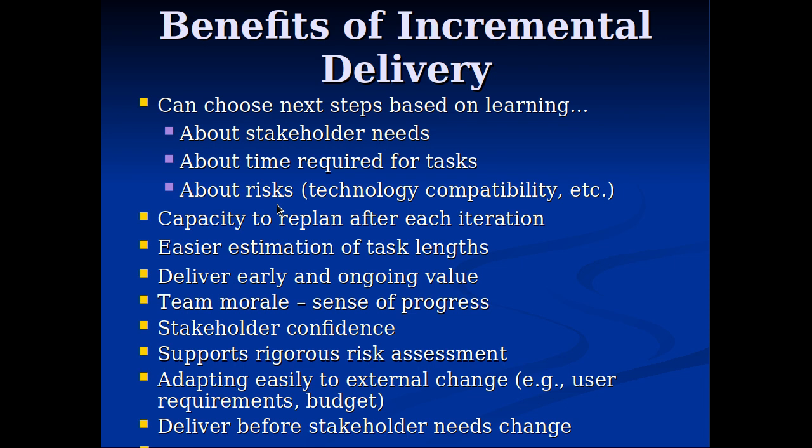So you may want to, in early deliverables, prioritize something not because it's high value, but because it's risky. That may sound weird, but you build what you call a spike prototype. Spike, the last spike. Prototype, meaning it's throwaway code. You focus on one issue, like does Node.js play well with Spark? And you just create throwaway code that tests how they work together and how they would accomplish a certain task. You don't have to use that code, but you make sure they work together well.